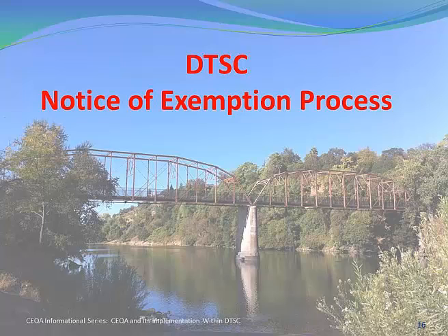And it looks like I've missed a couple of questions along the way. My apologies. Getting back to an earlier question, this is a follow-up. If you do a CEQA analysis on the RI, do you need to do another one on the feasibility stage, the RAP stage, et cetera? Yeah, the RI is one piece of the puzzle here, and as you move along from the investigation phase to the implementation phase, yeah, those would be two distinct CEQA analyses.